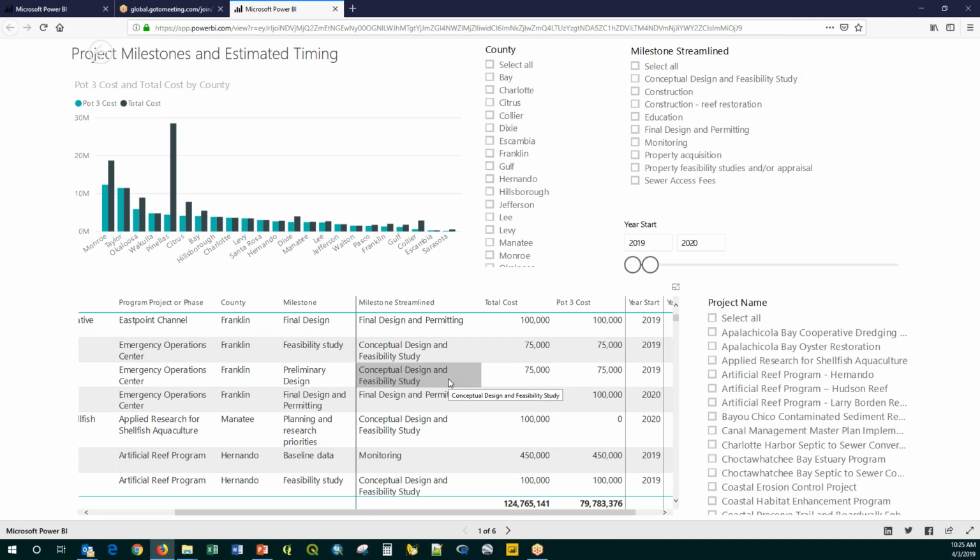And there have also been some counties that have been shifting project timing around. So if you have a project that's supposed to start in 2030, but you would like to start it now, and you have other projects that are supposed to start now that you want to start later, that's okay. We need to talk about it and look at it to make sure we're not at risk of exceeding the trust fund balance.